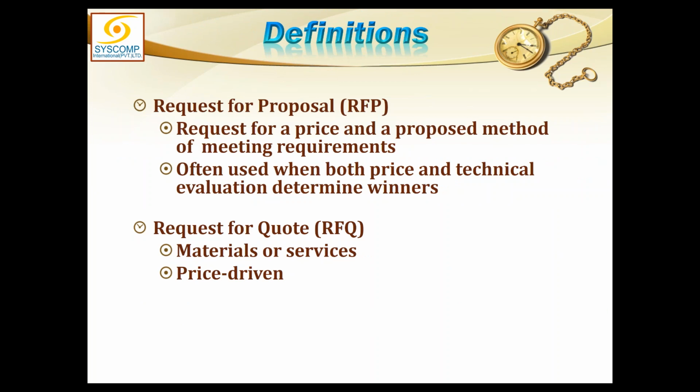A request for proposal is normally done for the purposes of a solution. When you want a solution, where the scope is slightly unclear, in that case we normally ask for a request for proposal. Like you see, I have special equipment installed in this room, and there are specific requirements that this room has to be kept at this level of temperature and this level of humidity.